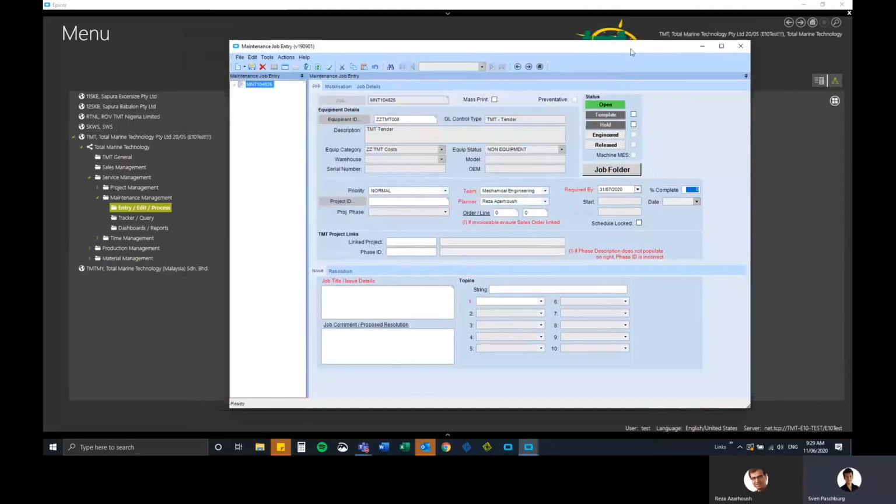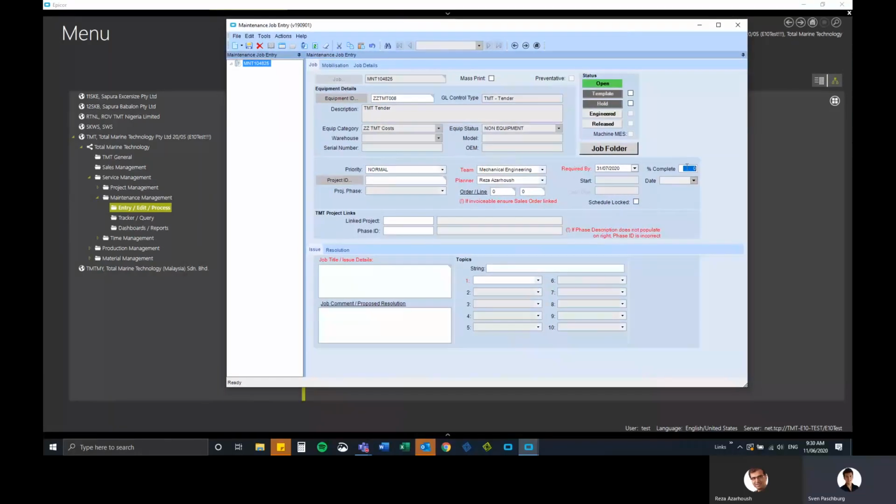But anyway, you can set a percentage complete for a given manufacturing or maintenance job, and say, well, it's 50% complete in my opinion. That was the date that I made that prediction on, and then project planners can refresh that data and give an estimated cost of completion. That's the word. Estimated cost of completion on projects.